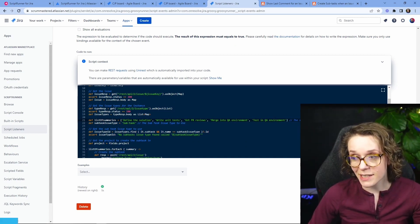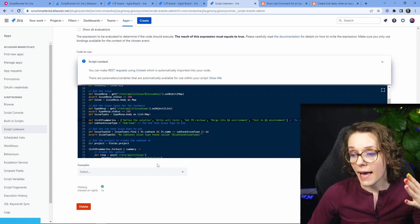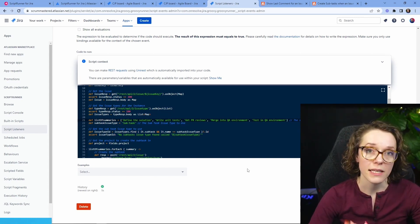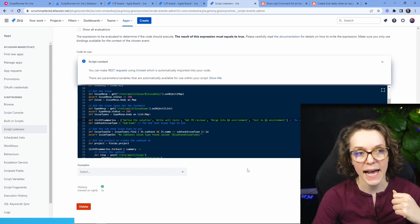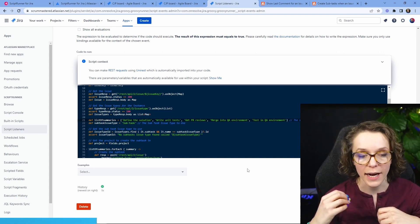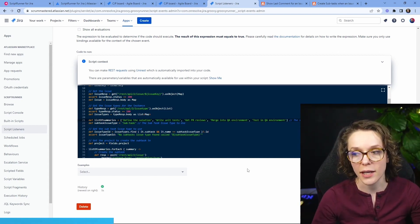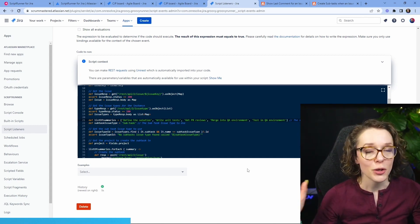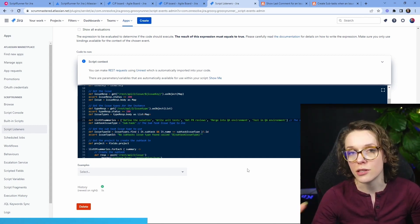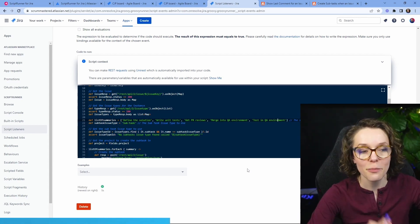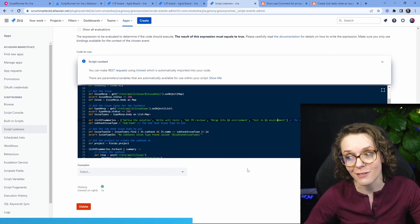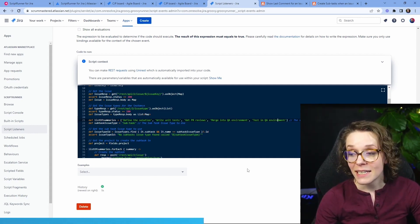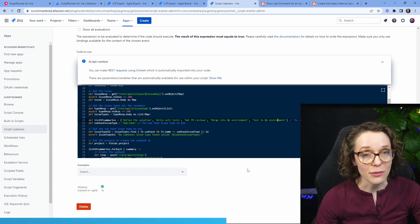So whenever a new issue is created in one of my projects these five subtasks will be created and it is a good use case especially if your team is maybe struggling or doesn't want to create subtasks but having subtasks can be so beneficial for helping you track progress especially visually on the kanban board if you don't have subtasks you will have difficulty figuring out whether you're still on track or not.